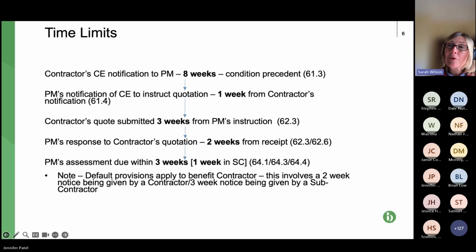So that's great news for the contractor. This is quite a valuable tool. Having said that, I'd be really surprised if a PM missed it, because obviously they're given a timescale and then a reminder before the default provision applies. But I have had an adjudication where a client was awarded over £1 million just for that situation where the PM did miss that 2-week reminder deadline. So that's the first point I want to make on that. What often happens is those reminder clauses are often deleted via the Z clauses, so via the amendments to the contract.